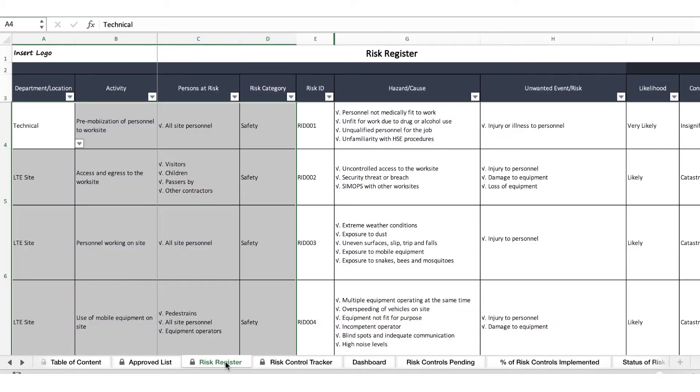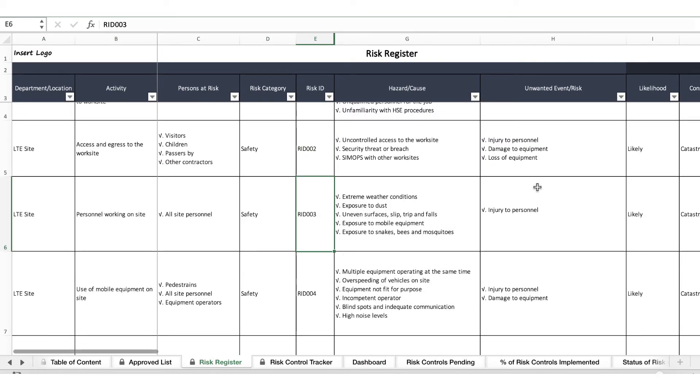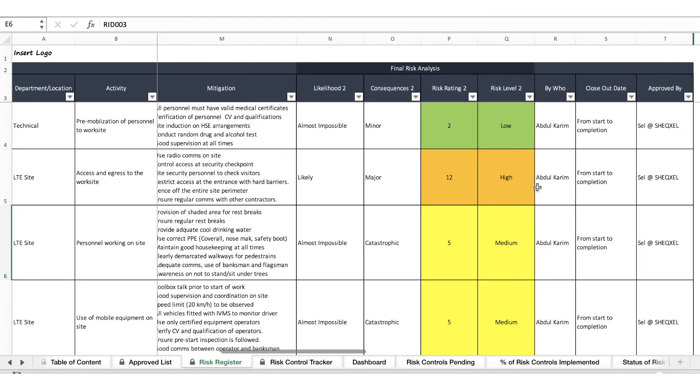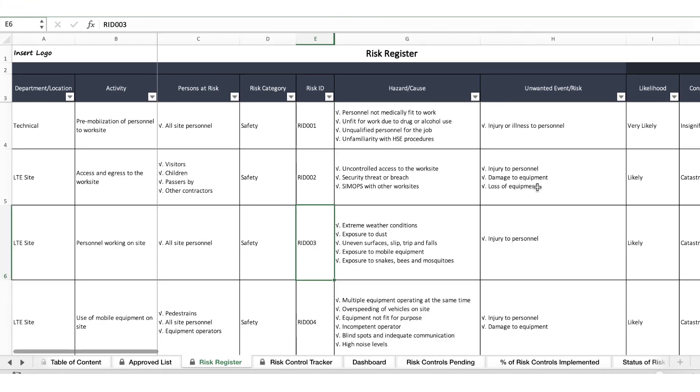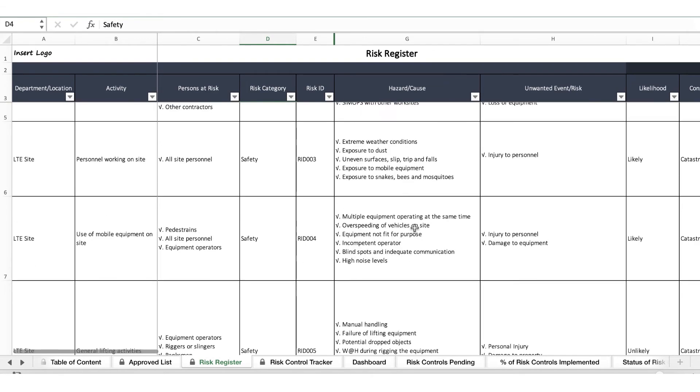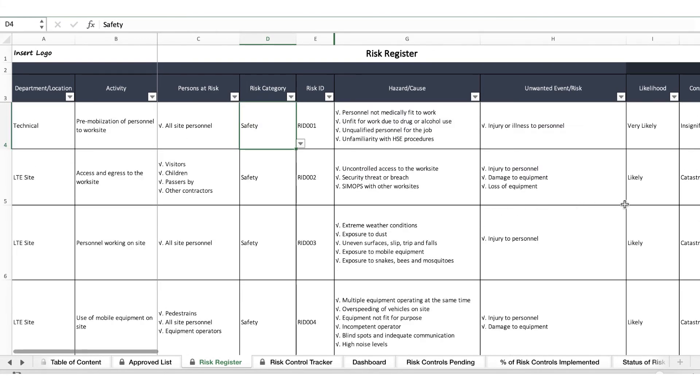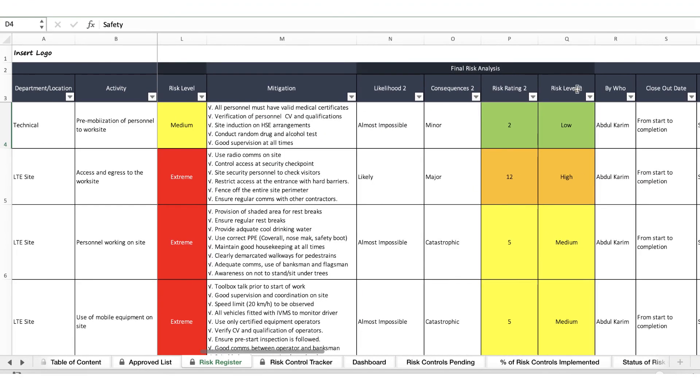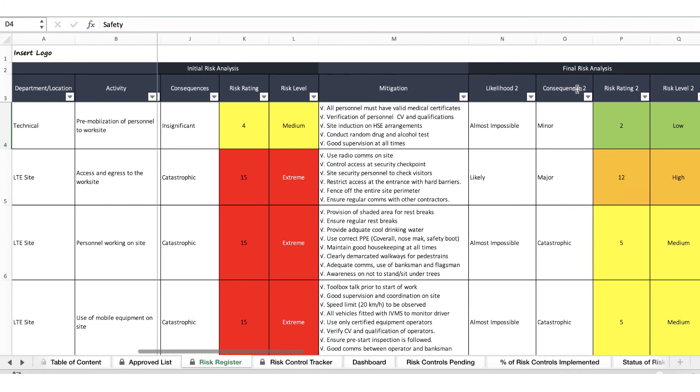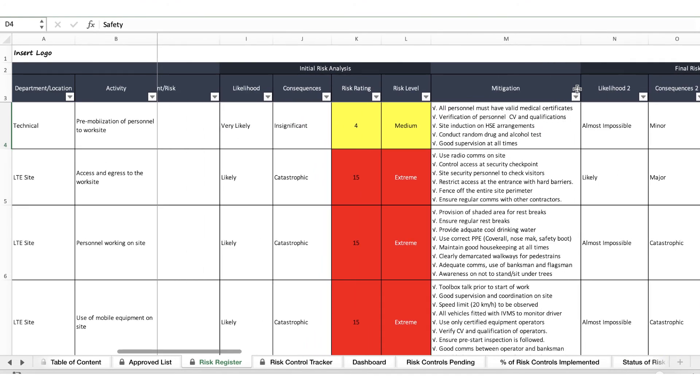Having had a comprehensive risk assessment like this, you should note that your risk assessment must be reviewed regularly based on changes in all these factors. It could be changing the activity, changing the person or persons affected, it could be an additional hazard or a new hazard have been identified. You come and update it and make sure that your ratings are all correct based on the reality on the ground. This is a qualitative risk assessment based on subjective classification of the risk level based on likelihood and severity.